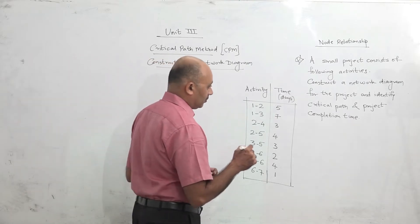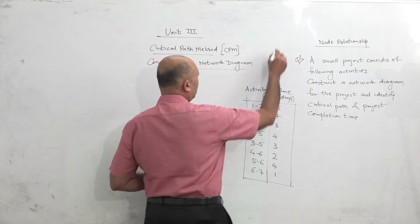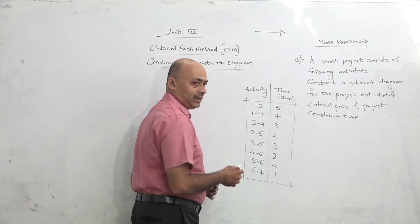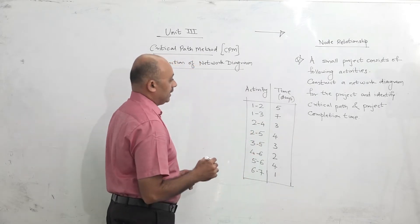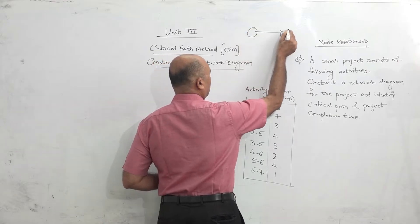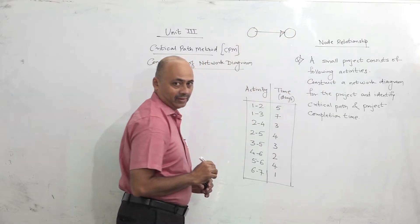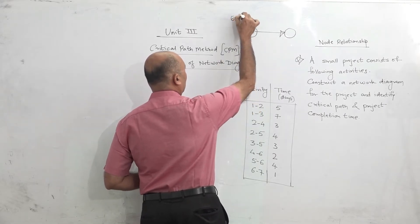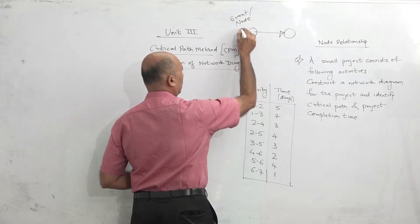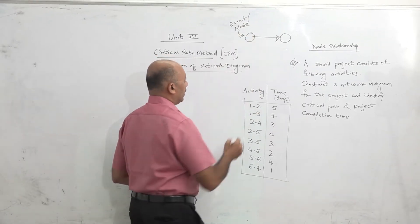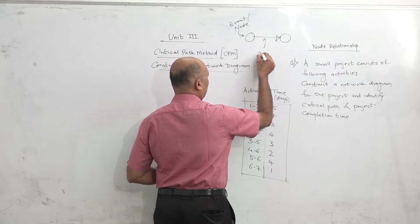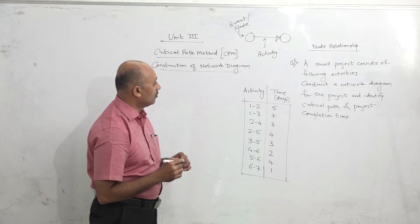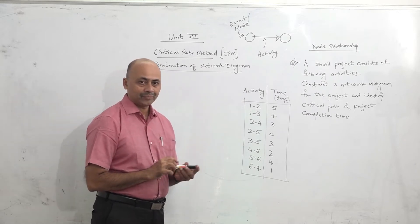The basic concept is activity and event. An activity is represented by an arrow, and it may or may not be given a name. An event is either the starting point or ending point of an activity. An event is also called a node. So either event or node — this circle is called an event or node, and this arrow is called an activity. Activity is always represented by an arrow, and event or node is always represented by a circle.